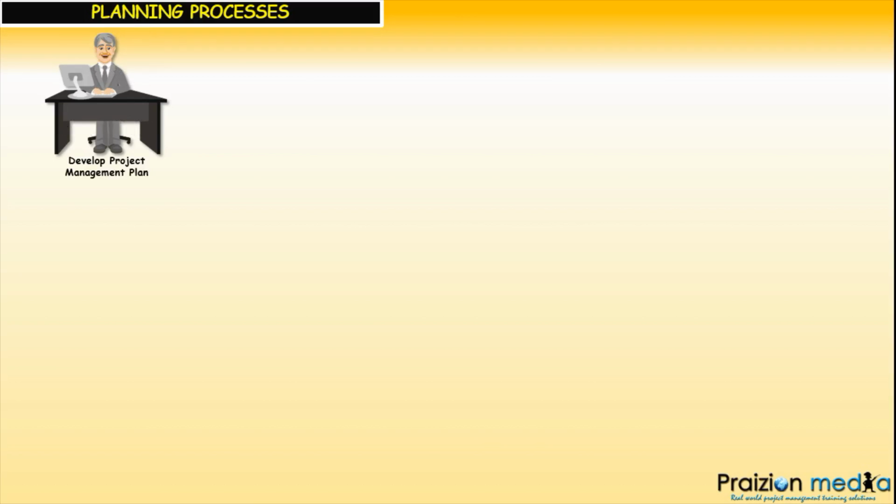And one of the things that happens a lot on projects is changes. So right off the bat, while this is still in infancy, we want to define how changes will be made to widgets, to plans, to documents, to various aspects of the project, to drawings. So the first thing we do is come up with a skeletal, as it were, project management plan, and this gives us guidance in a uniform way how to manage changes to project artifacts, to project documents, to project drawings, and so on.